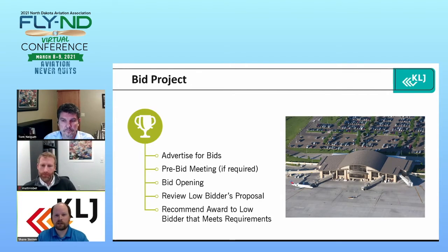And some of the things that we like to go over in those meetings include bidding requirements, Buy American, DBE requirement, your federal Davis-Bacon wage rates, project safety, and project timeline. So what this does is also gives contractors who may not be as familiar with working on airport projects the overview of what's required and kind of get everybody on the same page.